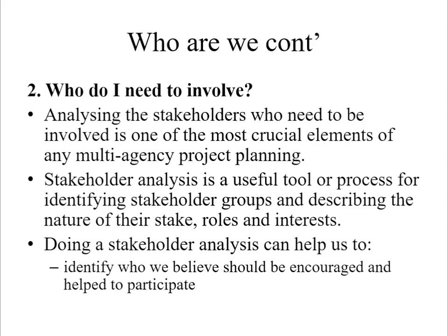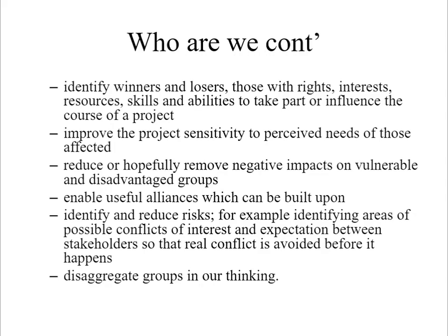After knowing the reason as to why others are involved, the next step is to know, who do I need to involve? Analyzing the stakeholders who need to be involved is one of the most crucial elements of any multi-agency project planning. Stakeholder analysis is a useful tool or process for identifying stakeholder groups and describing the nature of their stake, roles, and interests. Doing a stakeholder analysis can help us to identify who we believe should be encouraged and helped to participate in the project.